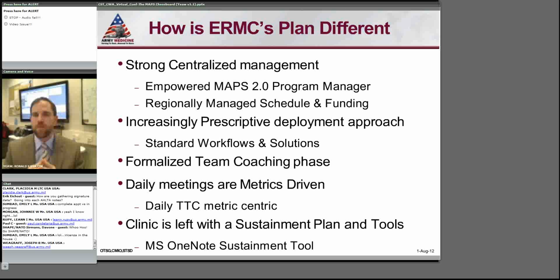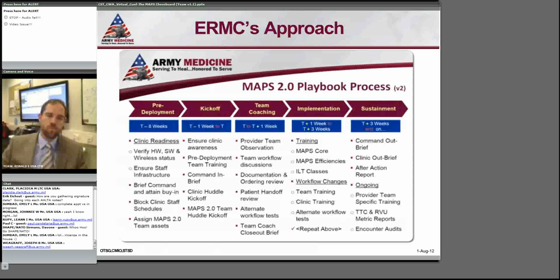And that's really the key element here, proof of concept that this can happen. We'll talk about time to close metrics a little bit later, but do keep in mind what I mentioned. I have a very unique take on it. Additionally, we also leave with a sustainment plan, and we leave them with sustainment tools. I'll show you examples of these tools tomorrow, but the fact is I put a plan in the commanding officer's hand that says, this is where you are right now, and this is how you can quantitatively verify that you're going to have success. So let's take a look at this approach.